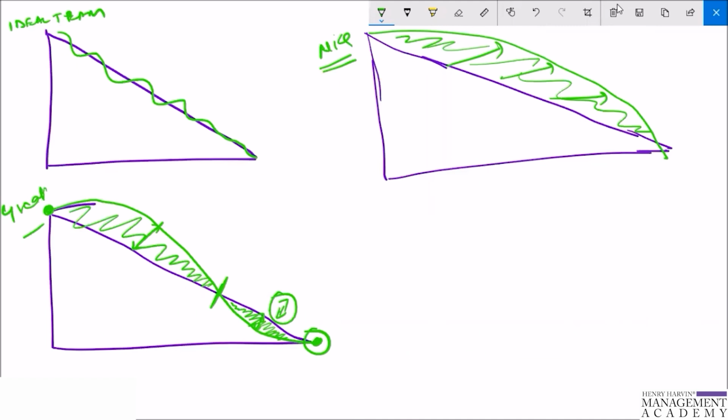Sorry. So the team should discuss a change of the plan immediately as they see the progress has been slowing down from the beginning of the sprint. Typically, it is suggested to move a low priority item from the sprint backlog to the next sprint or back to the product backlog. Why? Because if the product owner is adding some stories here, say two or three story points, what we can do is, from the sprint backlog, the team can reduce the work of three story points.